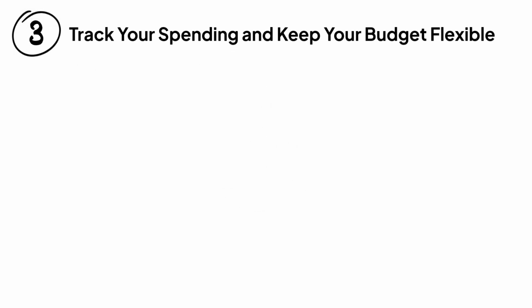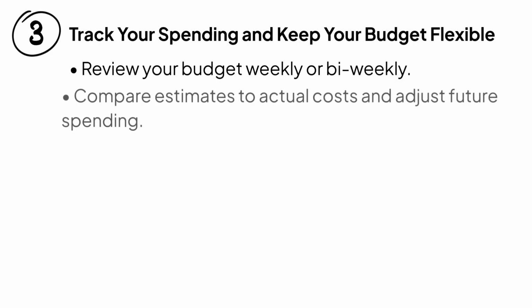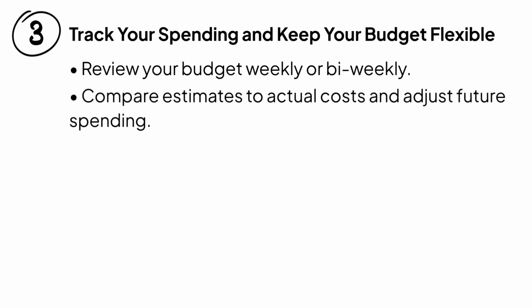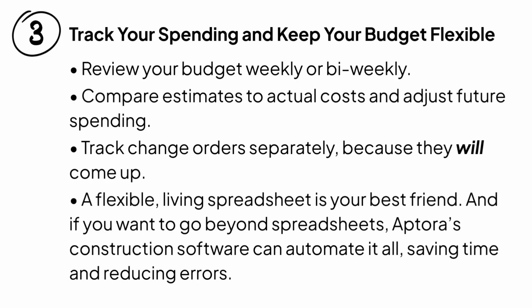Third, track your spending and keep your budget flexible. Review your budget weekly or bi-weekly. Compare estimates to actual costs and adjust future spending. Track change orders separately because they will come up. A flexible, living spreadsheet is your best friend.